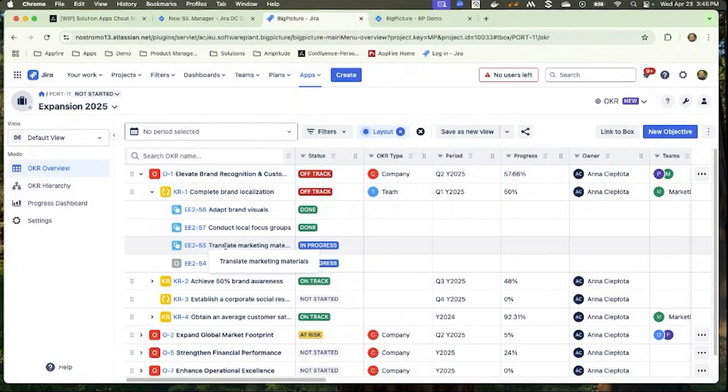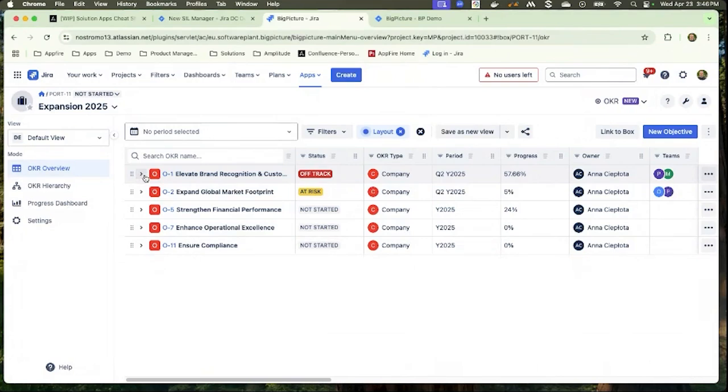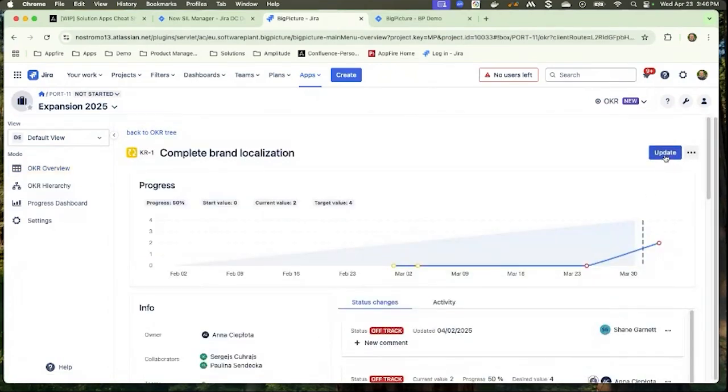And the other thing that we can do is look at this concept, objectives and key results. That seems to be an ubiquitous concept across the industry. And again, you don't have to adhere to a project management methodology style. You don't have to be agile. Whatever you want to be. What happens is that we have large objectives that we want to accomplish. We break those down into these things called key results, and you link them to your Jira issues. And what's cool about this is that it's its own object. It's a great way to have a monthly style meeting where we've planned out work for the next 3 months. Where do we stand? Are we going to accomplish our goals?